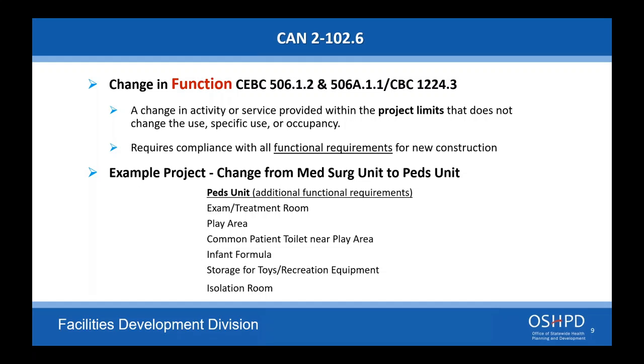And you have to show that you comply with the clearance requirements or space requirements, size requirements, et cetera, for those spaces. Now, if you're doing ICU to an ED and you happen to be reusing a soiled utility room or a med room, that's fine. But for the patient locations, you're going to have to show that you comply with those spaces, because those are not considered patient to patient when you're going from ICU to an ED exam area.